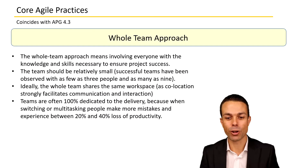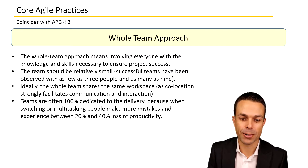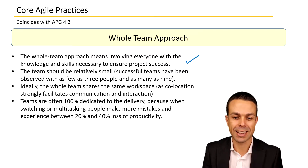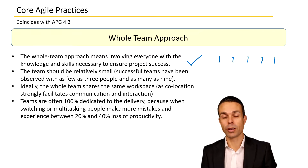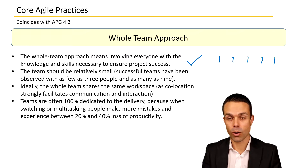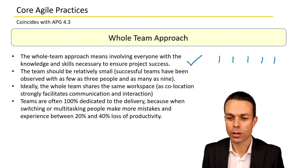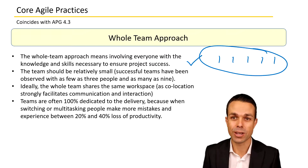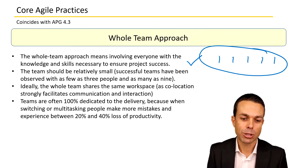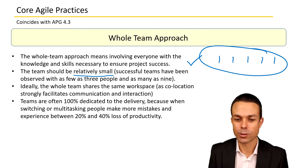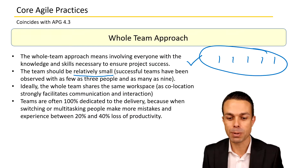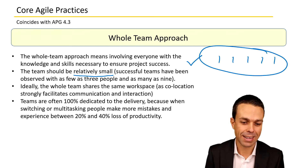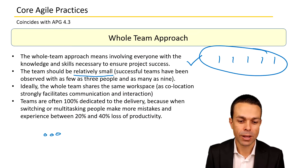The whole team approach means involving everyone with the knowledge and the skills necessary to ensure project success. Instead of gathering different people from all around the organization to work on your project in little bits and pieces, we're including them all in the whole team — so they're 100% dedicated to the project and can really deliver much more quickly. The team should be relatively small; successful teams have been observed with as few as three people and as many as nine. With only three people, the communication channels are much smaller and much easier.